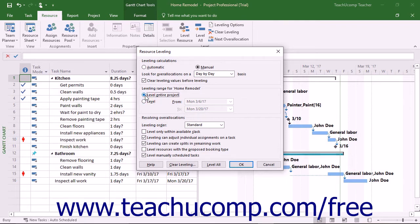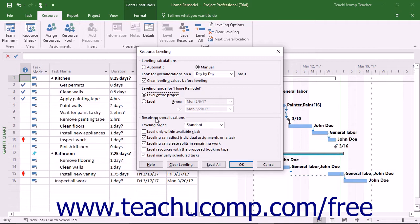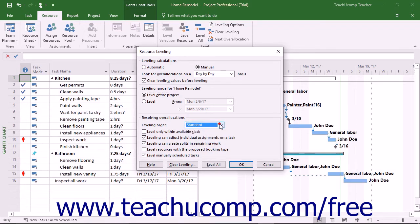Then, choose the guidelines to use for leveling from the choices in the Resolving Overallocation section of the Resource Leveling dialog box. For most projects, ensure that the Standard choice is selected from the Leveling Order drop-down. This resource leveling method respects the task relationships between the tasks in a project file and is therefore the most commonly used.